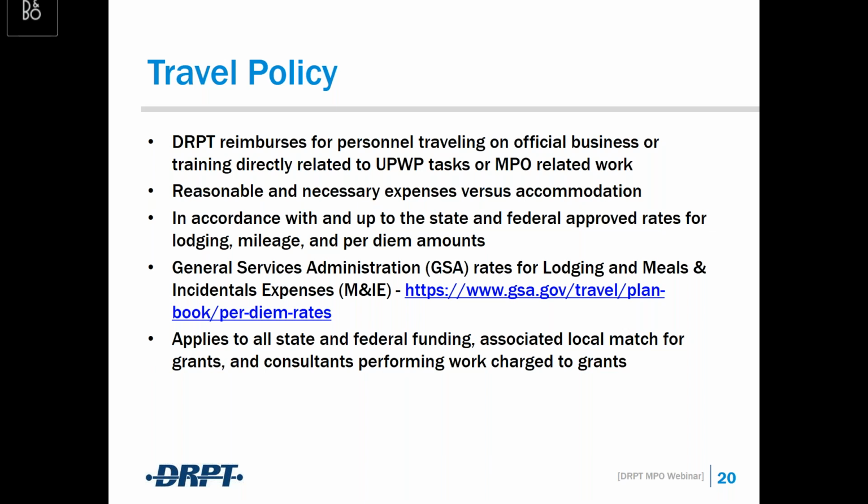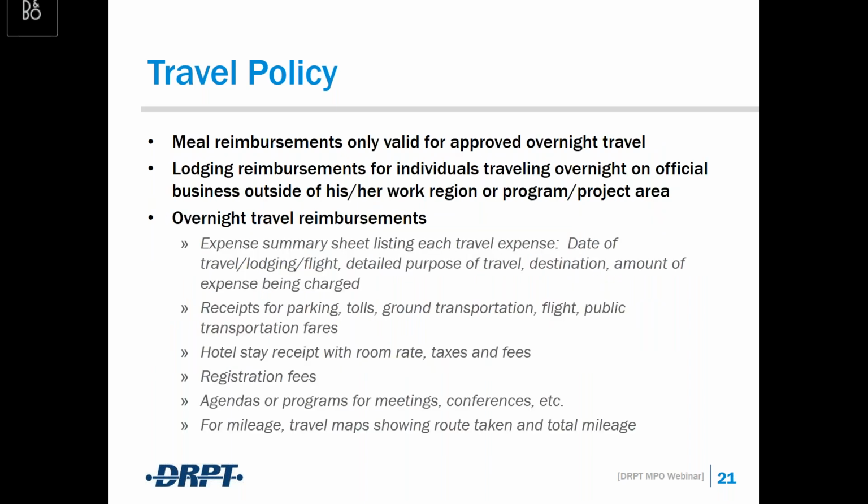We have a link here for the GSA website, which gives per diem rates. And I also wanted to point out that this is not just for MPO staff, but also for any consultants that you are using. They must follow the GSA rates posted on that website, and we will not reimburse for any travel that's above and beyond those published rates. So please do be aware of that.